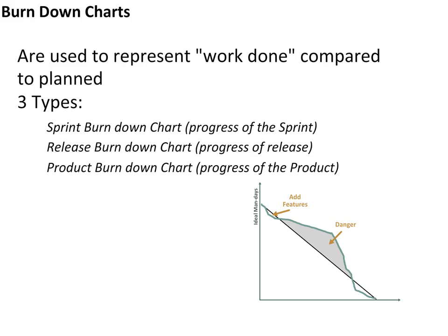So the reality is, maybe in the beginning you might have a slow pace, and if you have a slow pace, you see the line actually goes above the ideal line. But sometimes you might make faster progress than planned, and then the line might drop below the ideal line. So in the beginning, when you are making good progress, probably it's not a good time to add new stories. But in this specific example, towards the lower part, it seems like the team has been able to burn down most of the points a couple of days ahead of the end of the sprint. These are the times you can pull in some of the tasks at the back burner and complete them, so that you basically have a better velocity for each sprint.